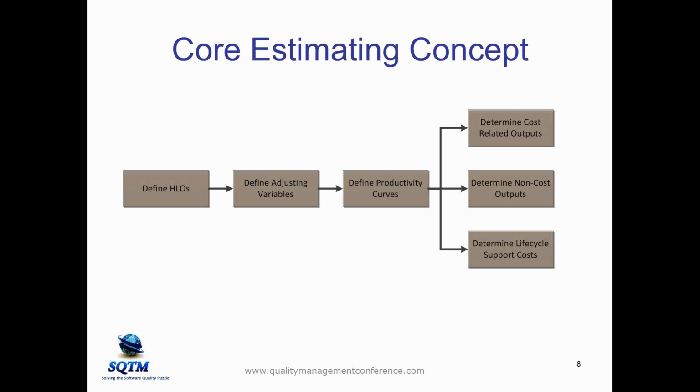What are we delivering? Then as we move farther across, there are going to be some adjusting variables, project-specific adjustments that are important in terms of estimating effort. These are going to be things like the experience of the team working with this set of tools and this application, perhaps how well written this reusable application is. There may be things like, is this a classified project or not? There's just a lot of different variables that allow us to adjust things.